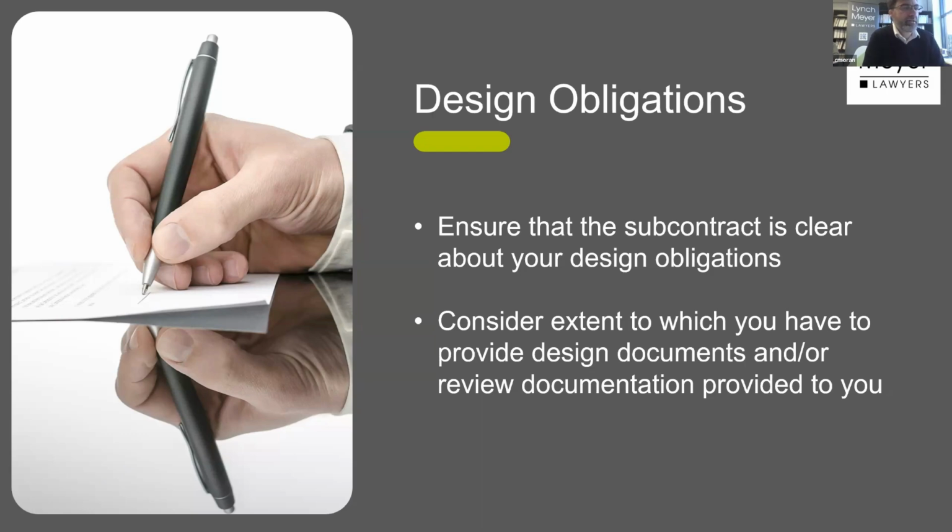My general philosophy about that is if you are doing the design aspect of your scope, that fitness for purpose warranty is not unreasonable. If you're designing it and building it, well, what you do should be fit for the purpose upon which you were engaged to design and construct. But if you're just doing certain construction work, so in the welding game, if you're only fabricating certain things and you're given a design, you're given the particular drawings and the specification that sets out this is what we want from you as a fabrication business.